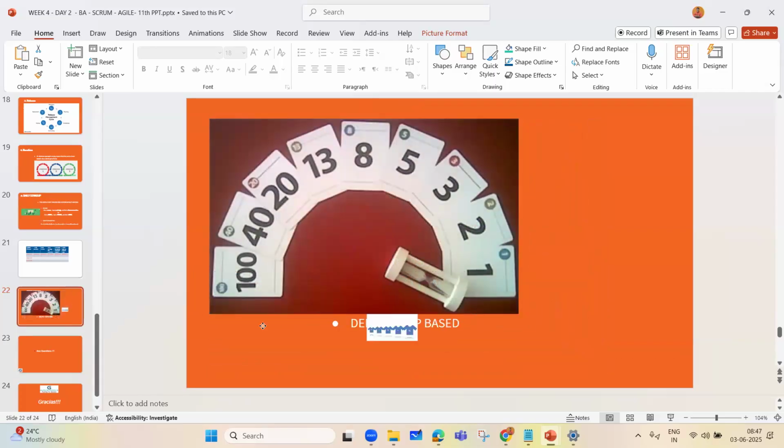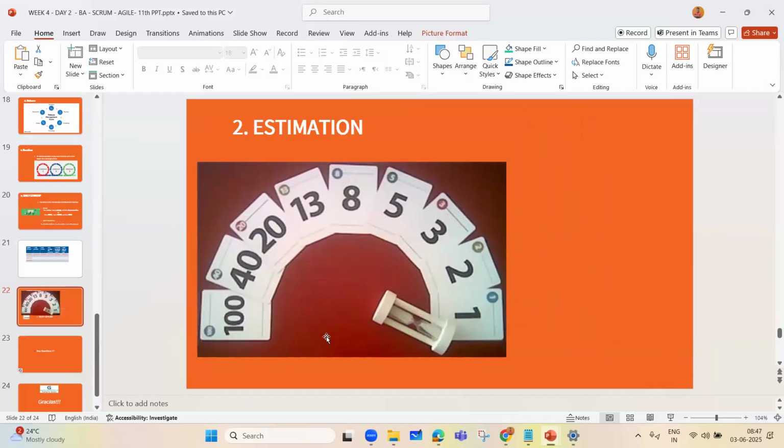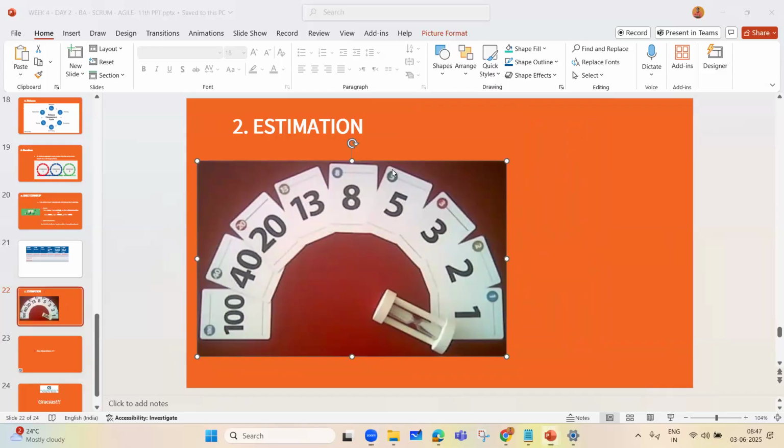What do you need to define? Baseline user story, and you have to understand the complexity of that work, and every user story will be given complexity with the unit of story pointing. Story pointing. So a baseline user story, say for example,